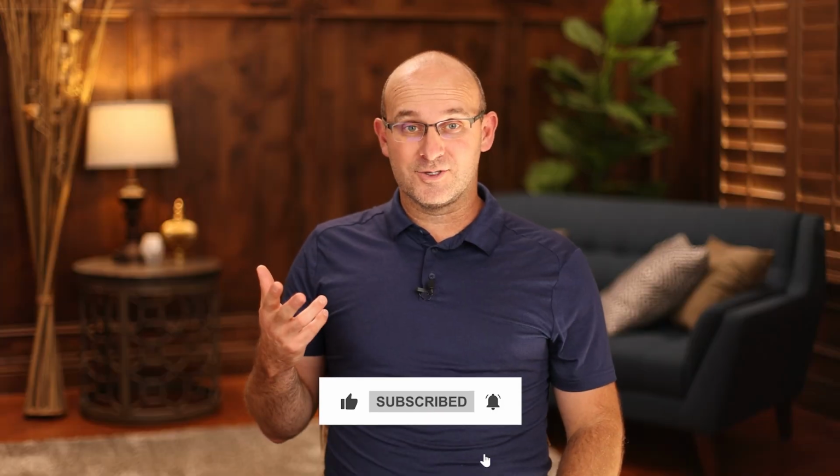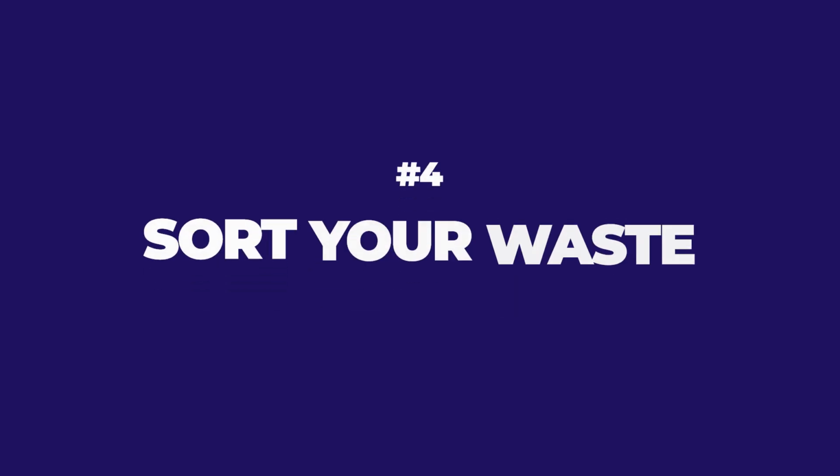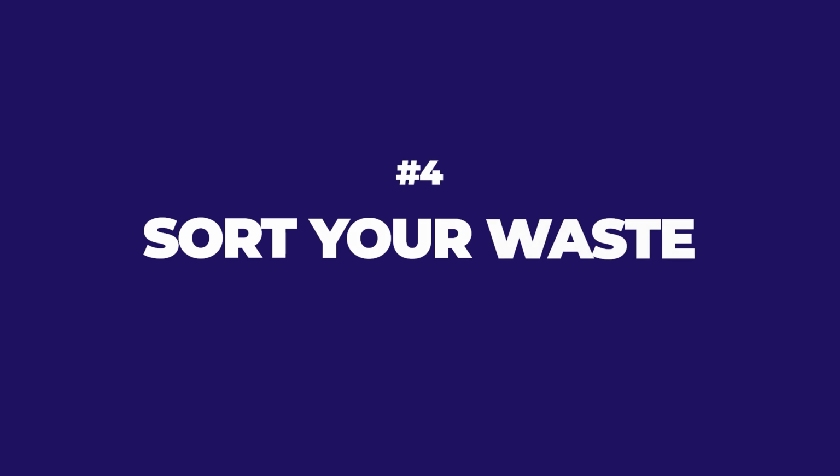But one of the things that you should really do is to sort your waste. Definitely, if you have a sustainable wood bin, a recycle bin, a scrap metal bin and a general waste bin, and then obviously separate bins for, let's say for instance, drywall mud, your painters, or the concrete washouts. Separating the different types of waste will allow us to recycle, reduce waste, and reuse what we're able to.